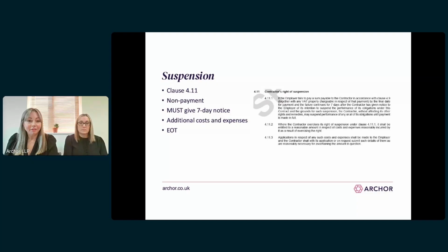Also, be careful if you are suspending, and ensure 7 clear days pass after the initial notice of intention to suspend before actually suspending. Any suspension of the works before this 7-day period has passed is likely to result in the contractor being in breach rather than the employer for non-payment. So if you're issuing your 7-day notice, you've still got to carry out those works for the 7 days until that clear 7 days have passed to then issue your suspension notice.